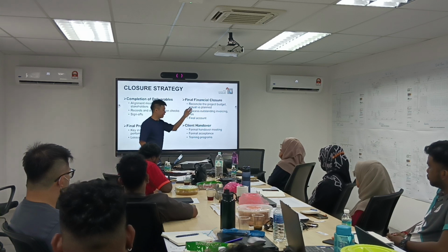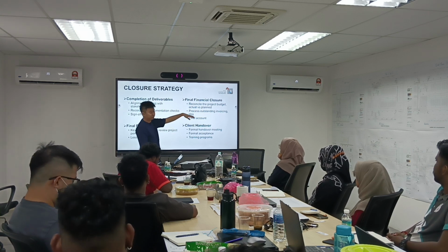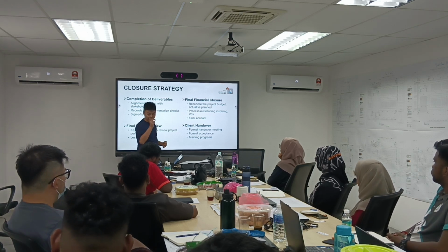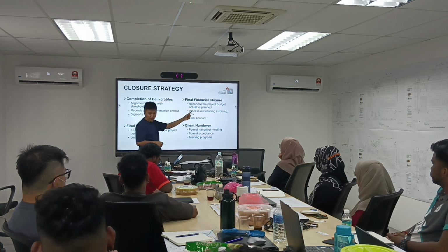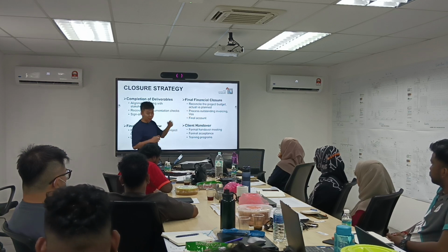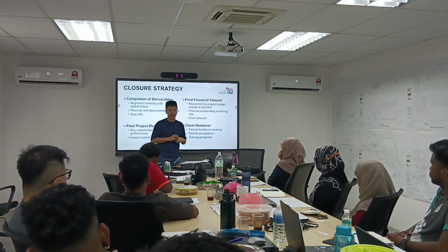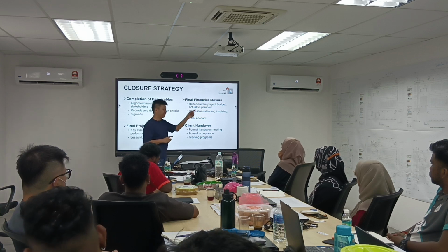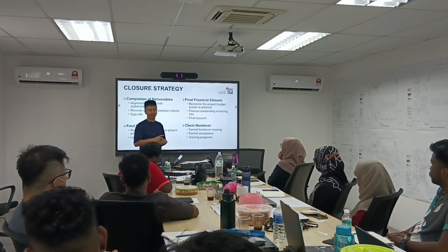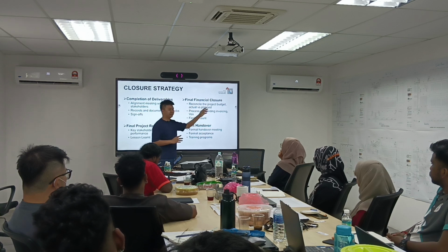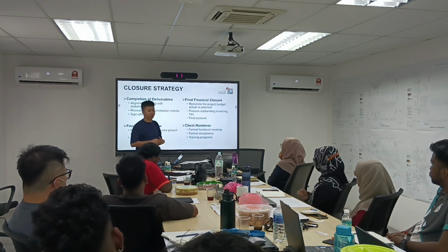Then if you go up slightly higher levels, you will touch the financials. Okay, so we should look at the data, the actual project budget used versus the planned project budget. How is the performance? So for JDC 1, I'm pretty confident we have a few hundred millions of savings. Okay, JDC2, I'm totally in the dark right now. I don't even know where I am, because we are simply buying stuff without thinking. We just keep buying, keep buying. So I totally lost track already. Then JDC4, I'm pretty sure we were on budget also.